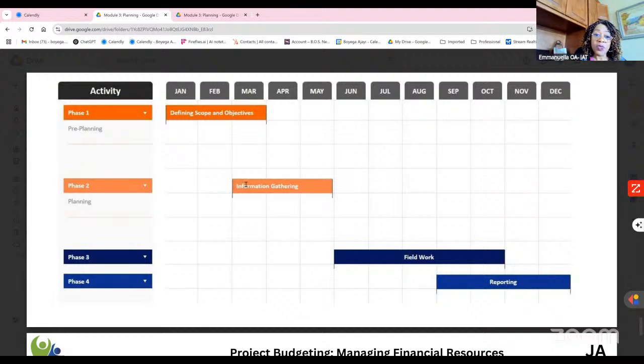The application needs to be reviewed, or the review process will start right after you submit the application, 5 days. Then the next day, after the 6th day, is when the review starts. How long will it take for them to review? 10 days. So you are now seeing the calendar for that process. If you're budgeting, you're getting your approval on June 16th.